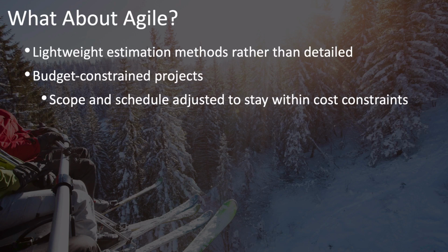Agile is also very useful for budget-constrained projects in which you've got a certain fixed budget and you want to get as much value as you can with that budget, because Agile focuses on delivering value early and delivering the most valuable pieces first. That way you can get the most out of your money as early as possible, and when the money runs out, you aren't left with an unfinished product. You're left with a product that has been elaborated on and improved based on the most important elements first, and stopping only when you run out of money.